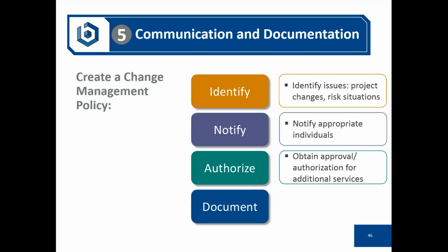And this is a feature in virtually every owner-architect agreement you will see. It's in the AIA agreements. It's certainly going to be in contract and owner-drafted agreements and other standard agreements that institutions and governments use. The reason is that they have that design budget to maintain as well as the schedule. And they need to know that somebody in their organization has made a request for you and your engineers to do more work, which might jeopardize the schedule and cost them more money, cause them to eat into that design contingency that they had established.